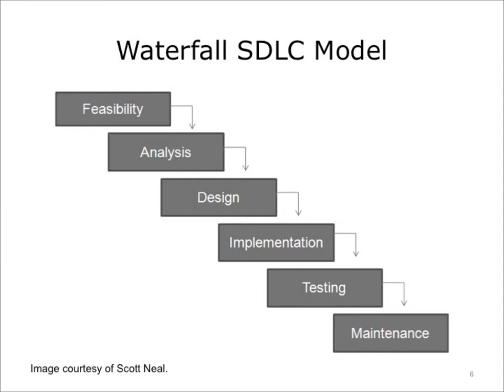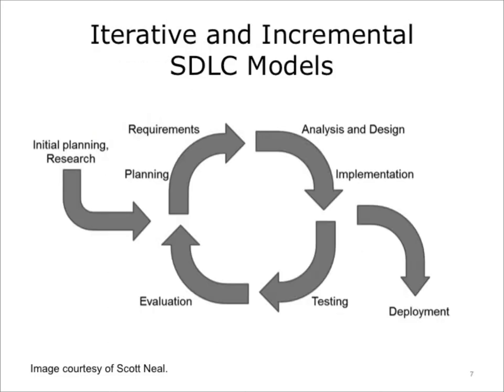Let's take a brief look at how the phases relate to each other. In the waterfall model, the initial assessment of feasibility is followed by analysis, then design, implementation, testing, and maintenance phases — each flowing sequentially. By contrast, the iterative or incremental model starts with initial planning and research, then begins a cycle of planning, requirements, analysis and design, implementation, and testing and evaluation, which repeats as needed until the decision is made to deploy. Now let's discuss what each phase generally entails.